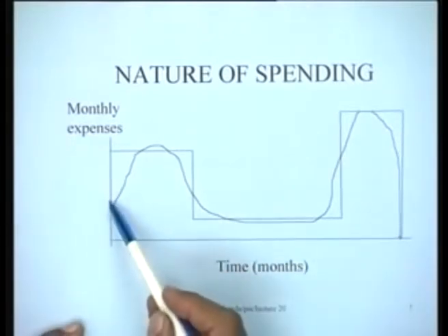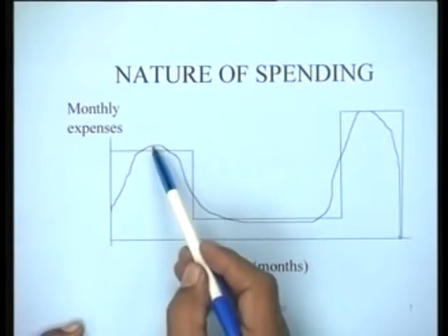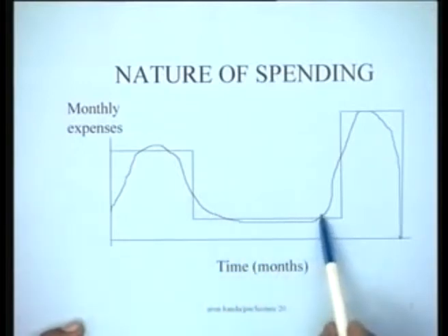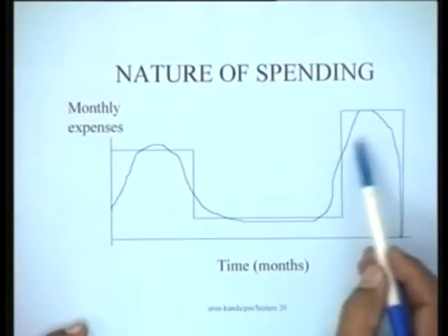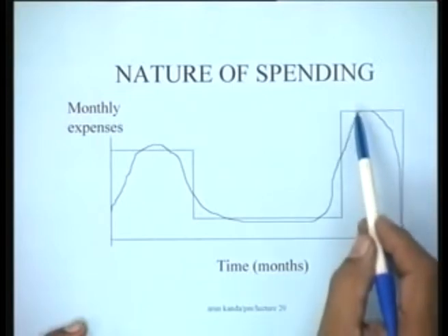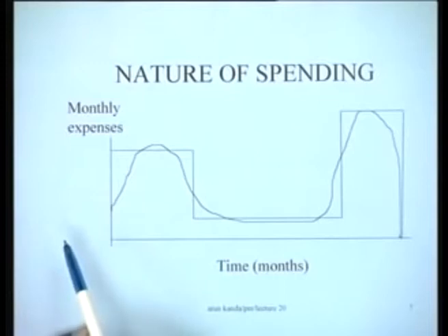So, one can expect that in a typical activity the pattern of expenditure will show an initial peak, a common period when the activity is going on, and finally a situation when there would be a final settlement of expenditure with all the contractors. All the money has to be shelled out during this particular period, and this would be the nature of the activity.